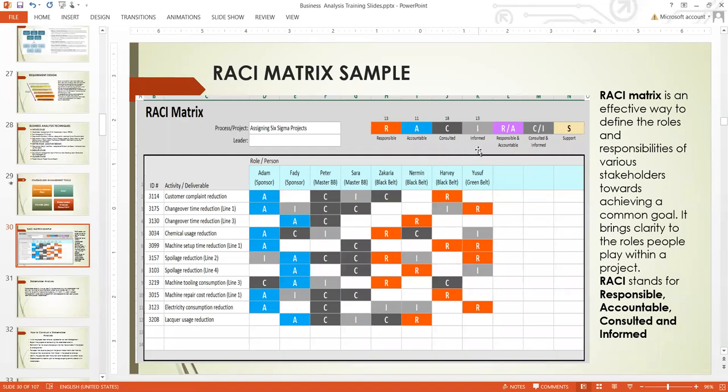So you can add the person within the Basecamp and then configure the level of access control. The person might not be able to do anything. He cannot tamper, he cannot change any document, he cannot delete any document. All he can do is sign in and view what is going on. So his access is just view. Because within the environment, as the project manager, you have the power to assign everybody the level of access control you need the person to have. If you want some people to just be following the project, then you just give them that access.